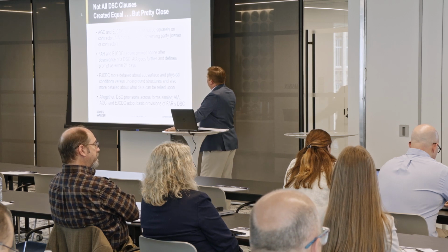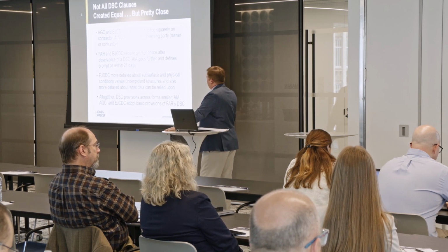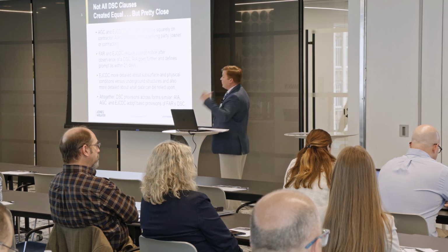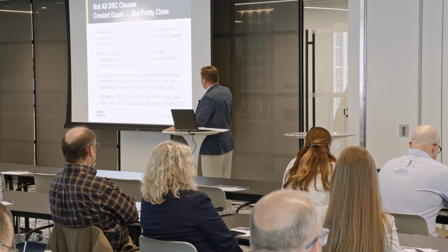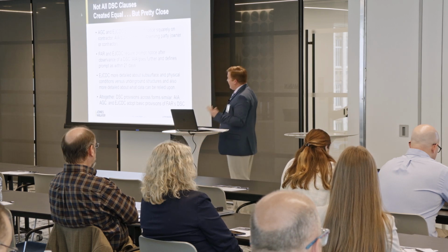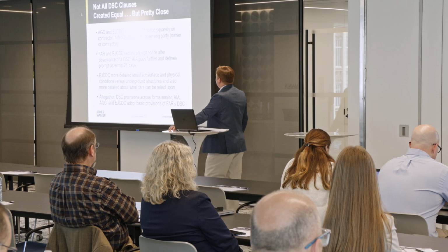The FAR and EJCDC require prompt notice after observance of a different site condition. The AIA goes further. It defines prompt as 21 days. The EJCDC, perhaps not surprising, drafted by engineers.